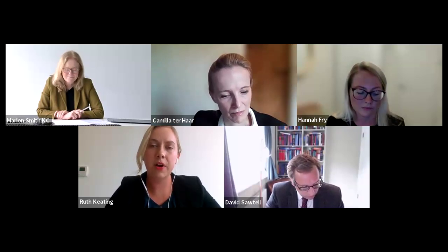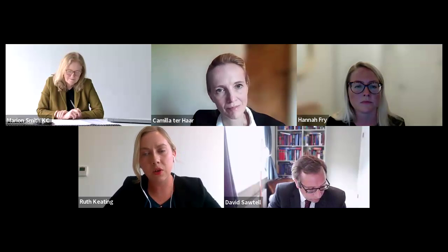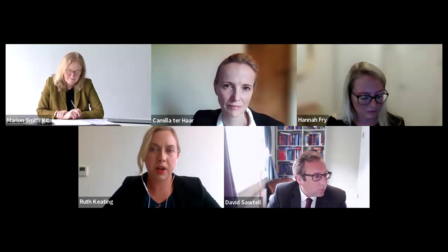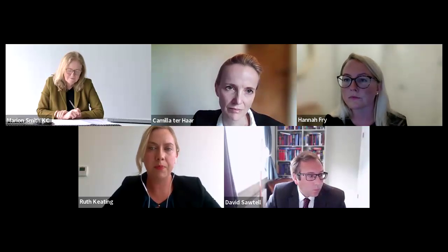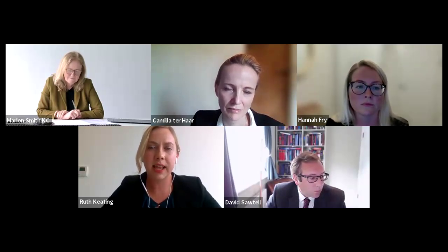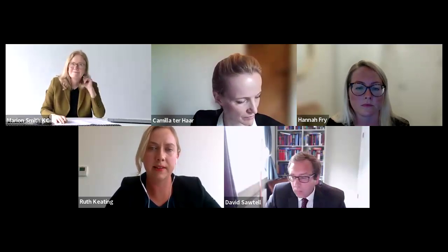And there's a clarifying point at the bottom where it says that that applies to guidance by the United Kingdom government or any of the devolved administrations, any local or public authority, or any equivalent authority governed by public law. And finally, it says in the case of guidance by the Construction Leadership Council or its successor. I'll come back to that.